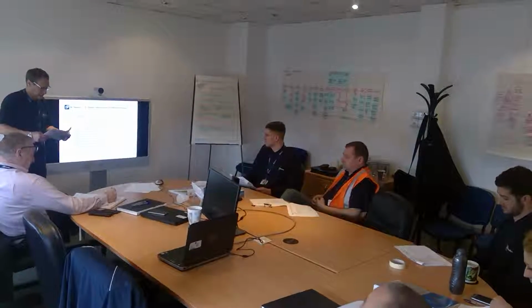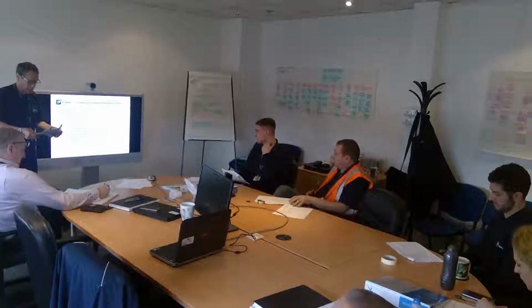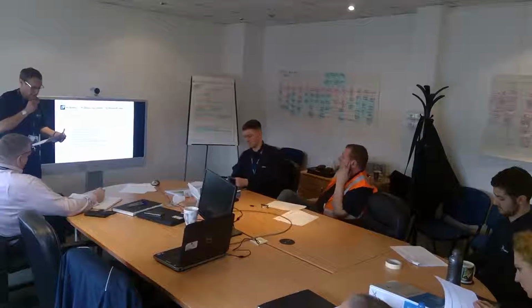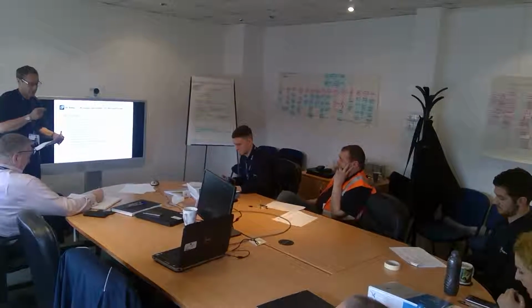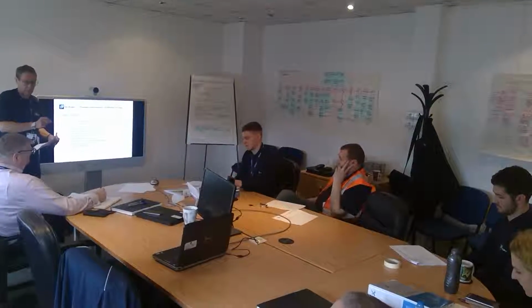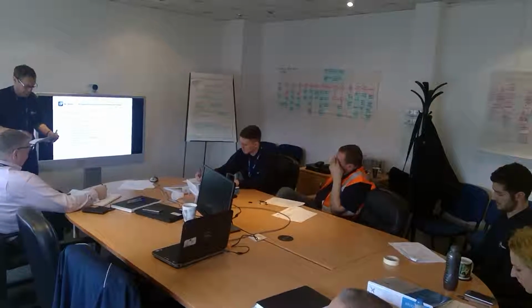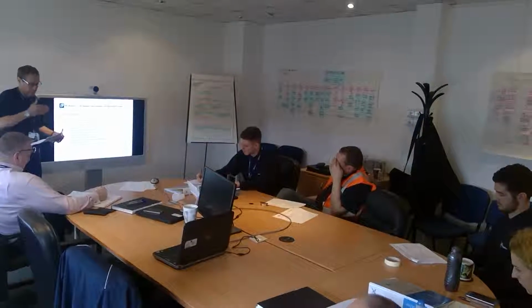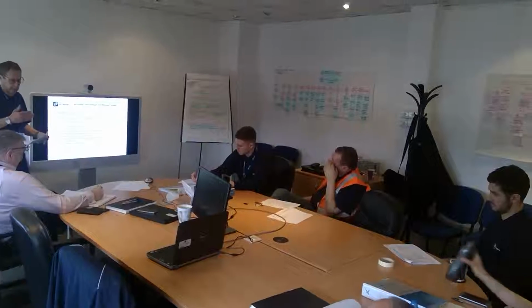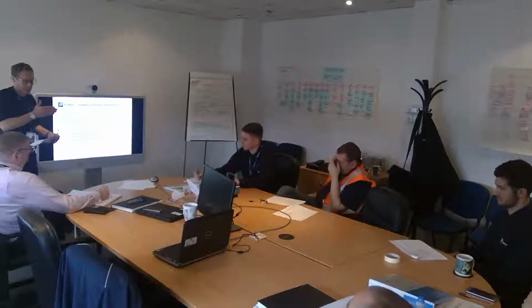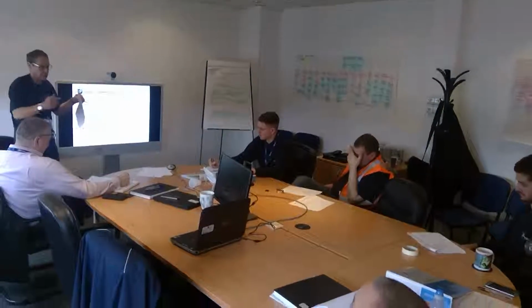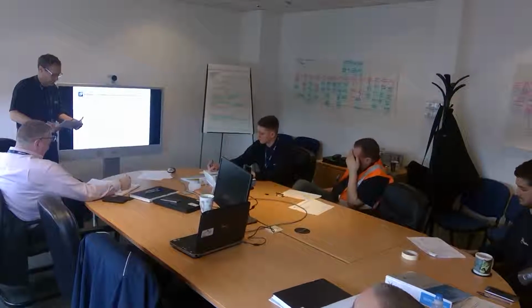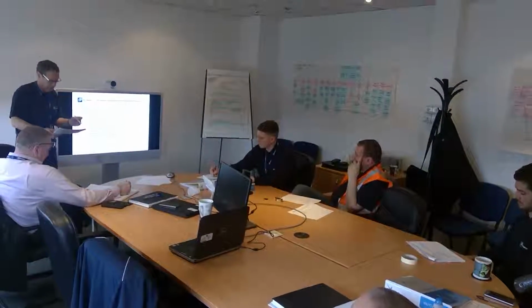This is quite a biggie. It's review of a project handover and stage meetings. We used to have a system like the rest of Baines where we have a 30% technical review, a 60% and a 90%. We've trimmed that down, and we've got now meetings that don't really fall into any category. So it's difficult to have the structure that we need.